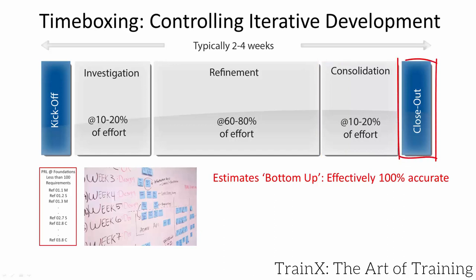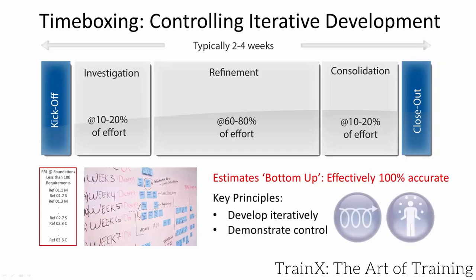Closeout follows with formal acceptance of the deliverables by the business visionary and technical coordinator. Typically a short timebox retrospective workshop for the SDT follows, to learn from the timebox and take actions to improve future timeboxes.